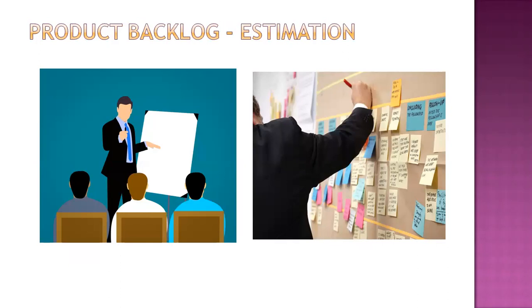So the product backlog is a collection where all the work items related to the project are available. First, the product owner will be ordering these work items based on priority. This is the first thing that the product owner will be doing. Based on priority, the product owner will be ensuring that the required information is available on these work items, so that these work items can be taken for refinement or not. That is the second thing the product owner should do. Now, if the order of priority is clearly available, plus the clarity of information is also clearly available, we are ready to start the refinement.